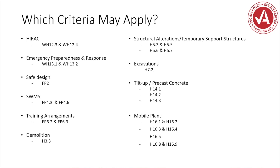As far as what criteria may apply, there's quite a lot. The hierarchy of project-specific risk assessments needs to contain detail regarding ground conditions. We need to make sure we have adjacent landowners and underground assets all identified within the project risk register. Then we have WHS 13.1 where we talk about emergency preparedness — making sure we identify potential emergencies and have relevant plans for what we're going to do in the event of an emergency.